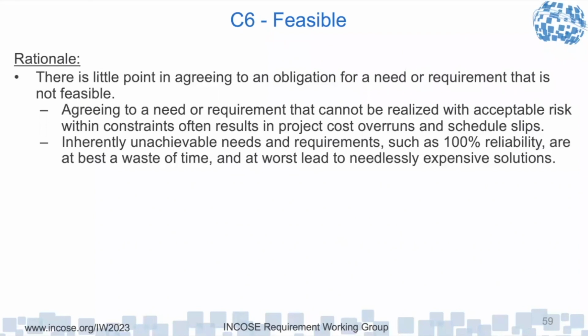And especially if you think about a contractor supplier, now I've got all kinds of contractor issues. If it's fixed price, that supplier sure has accepted a whole lot of risk if they haven't done that feasibility assessment. If it's cost plus, then the customer has a whole bunch of risk. If it's cost plus done by anyone outside the government, I don't know about that either. We certainly would cost plus.